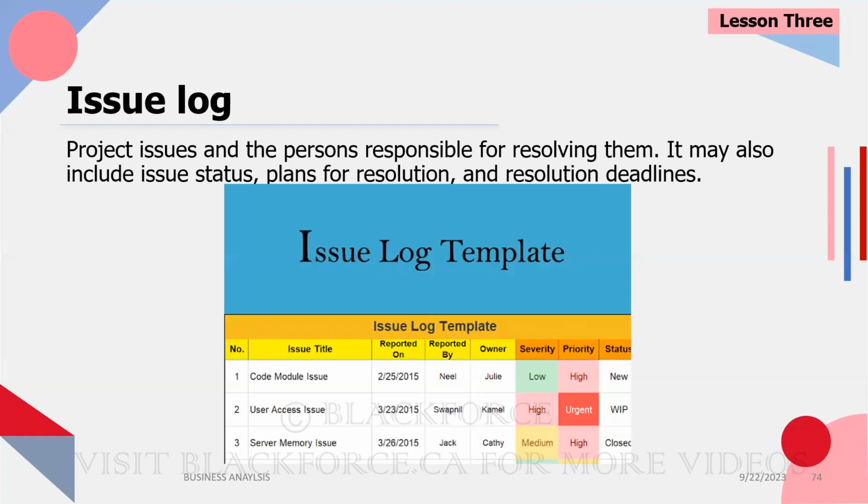If your developers are gold plating, they stand the risk of not getting to the other important stuff because there's only so many hours in a day, and the project only has so much money to pay. So all the developers or anybody building should be focusing on high priority, then medium priority, then low priority, rather than taking one high priority and gold plating it when they should have moved on to the next one that is high priority. So a developer might get caught up doing this, but you as a BA, right?